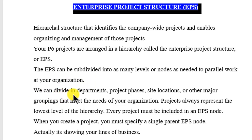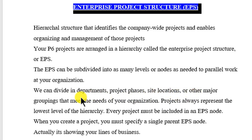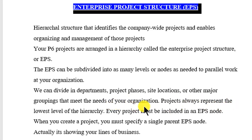We can divide the EPS into departments, project phases, site locations, or other major groupings that meet the needs of your organisation. Projects always represent the lowest level of the hierarchy.